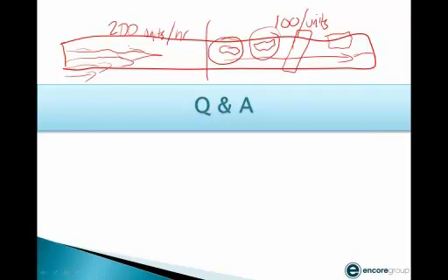This is the same job, same crew, same management, same equipment. We could get 200 units per hour, and you cost us 100 units, and basically, our productivity went in half. In other words, it cost us twice as much. Now, remember a while ago, we talked about the total time, right?